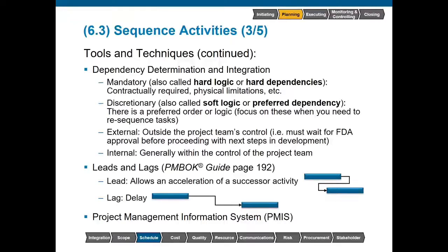We have dependency determinations. There are different types of dependencies that you may see within your exam, and one very important aspect here I do want to point out, we do have some other names for these types of dependencies. So a mandatory dependency, it may also be called hard logic or a hard dependency. And the questions may ask you about this with absolutely no context clue whatsoever. So it is very important that you make a note that these could be used interchangeably.